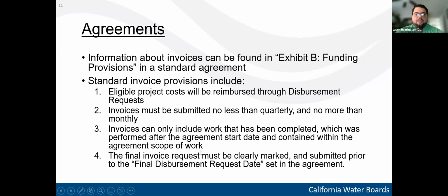And so on the title page, there's a few important dates that the agreement highlights. And so one of them is the work completion date, and then typically right under that's the final disbursement request date. And so just make sure that the final invoice for the agreement is submitted prior to this date.